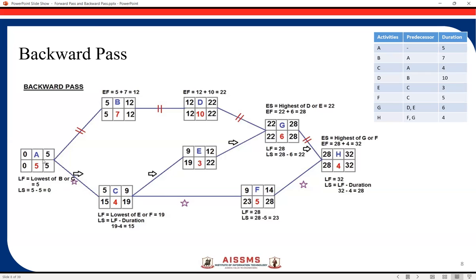For the activity preceding both B and C, there are two successor late start values: 5 and 15. We must take the smaller value. Since 5 is smaller, we take 5 as the late finish for that activity.